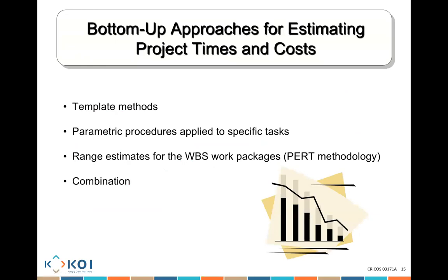On the other hand, there's a bottom-up estimation. Really, we try to find in detail what's the project time, what's the project cost, and so on. The way we estimate bottom-up, sometimes, let's say we are talking about a repair job. A company might have a very standard format for every repair job. So you use that template and say, okay, estimate the time based on this template, and estimate the cost. Every job is identical.